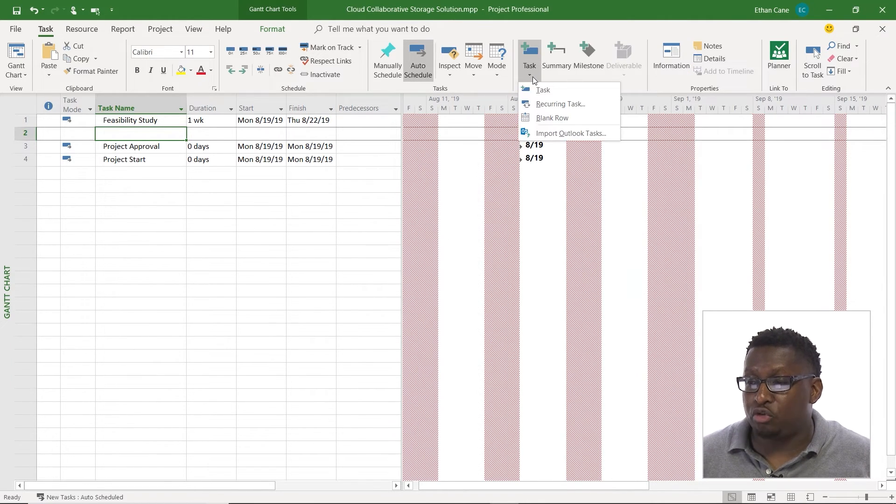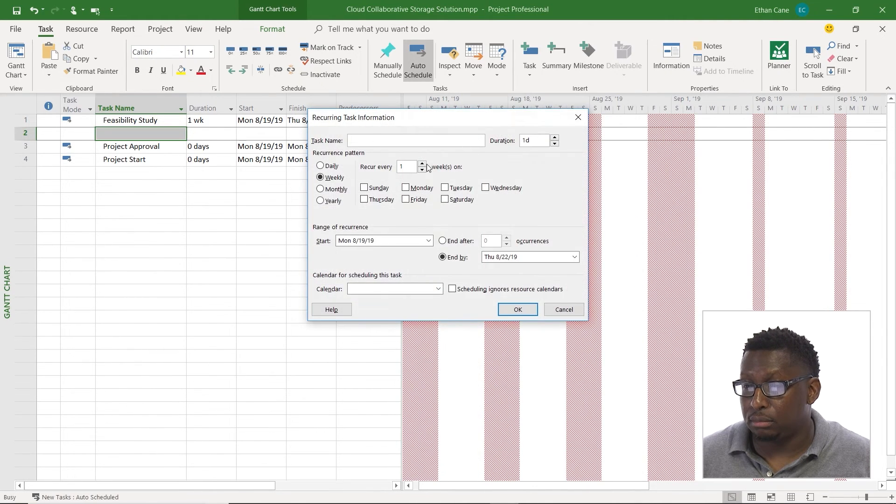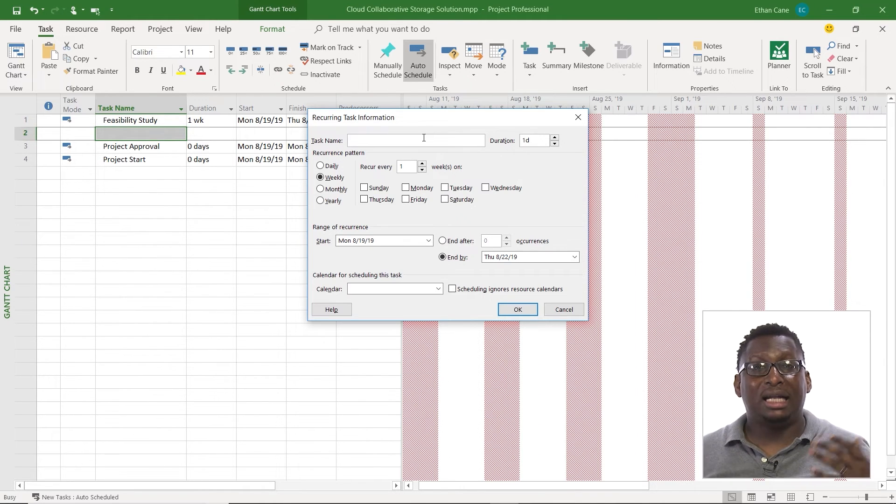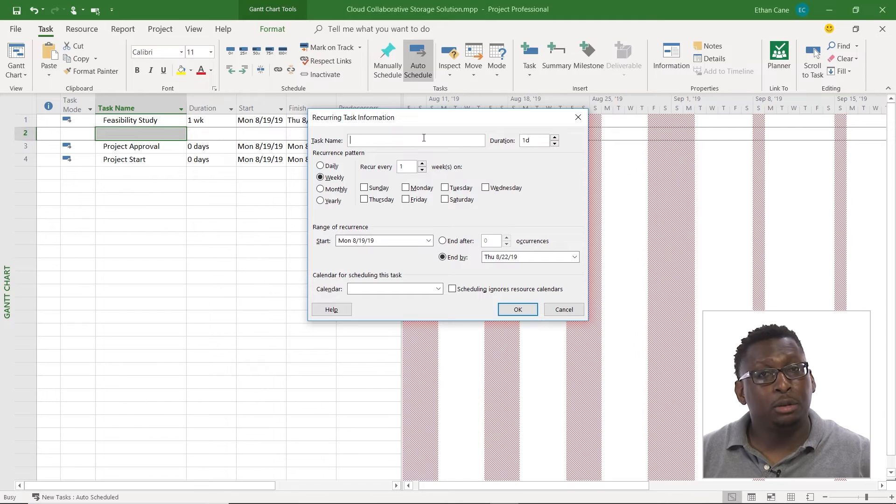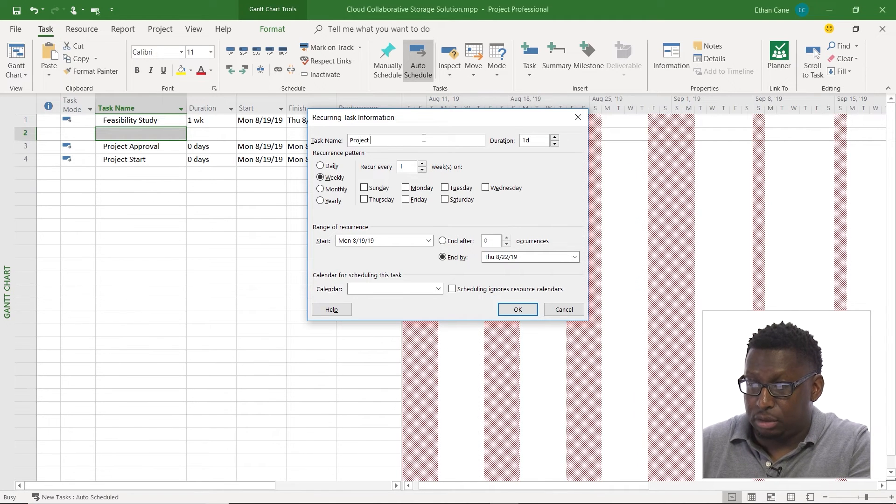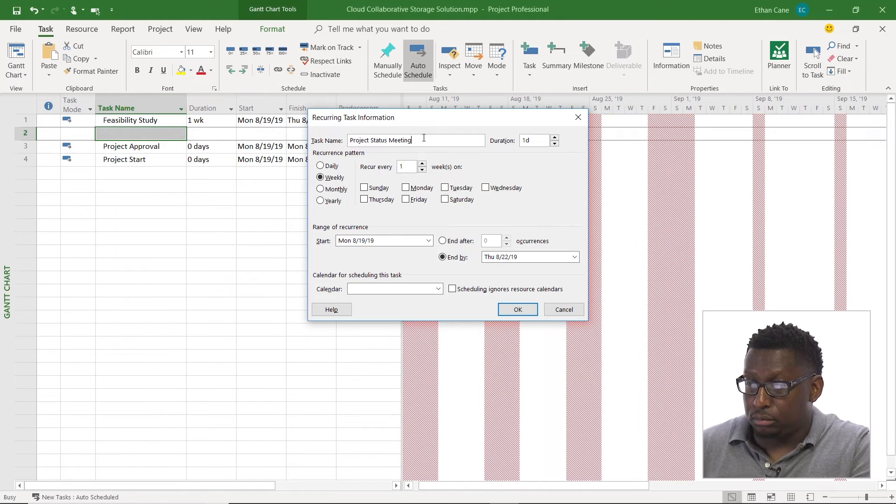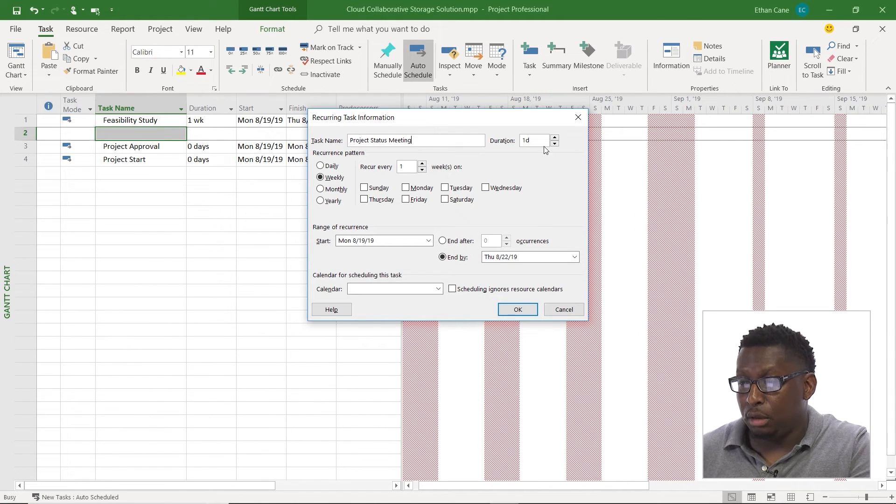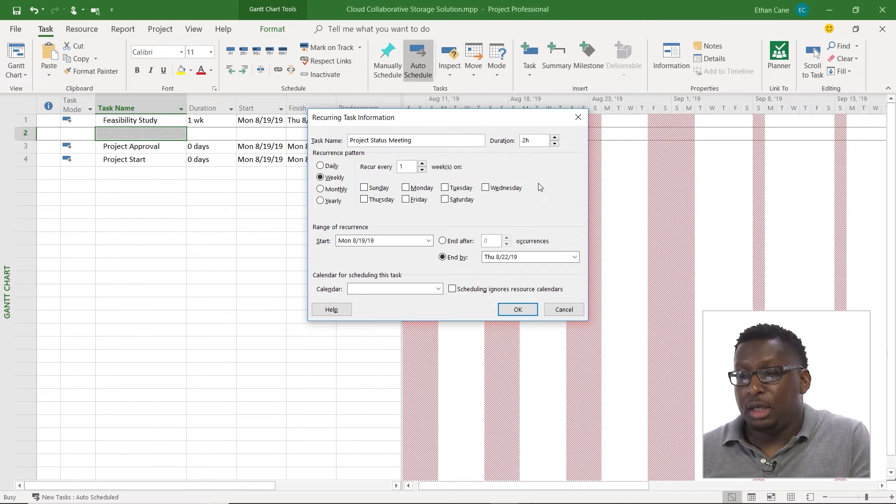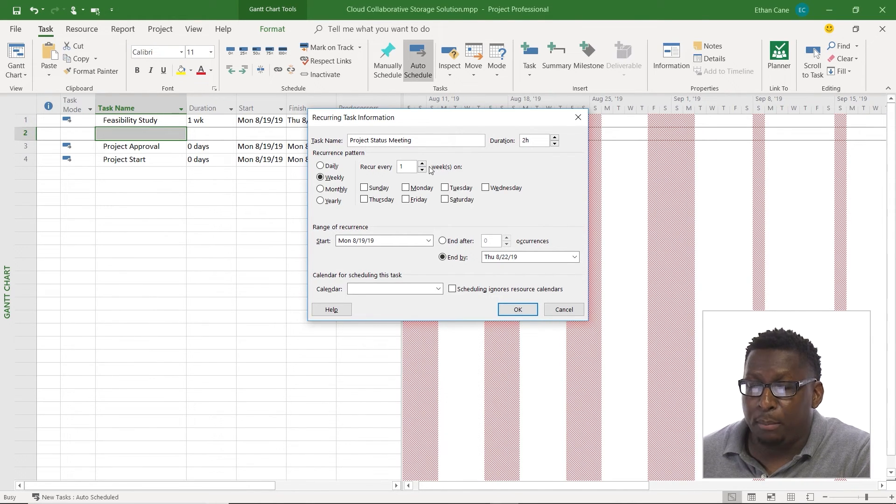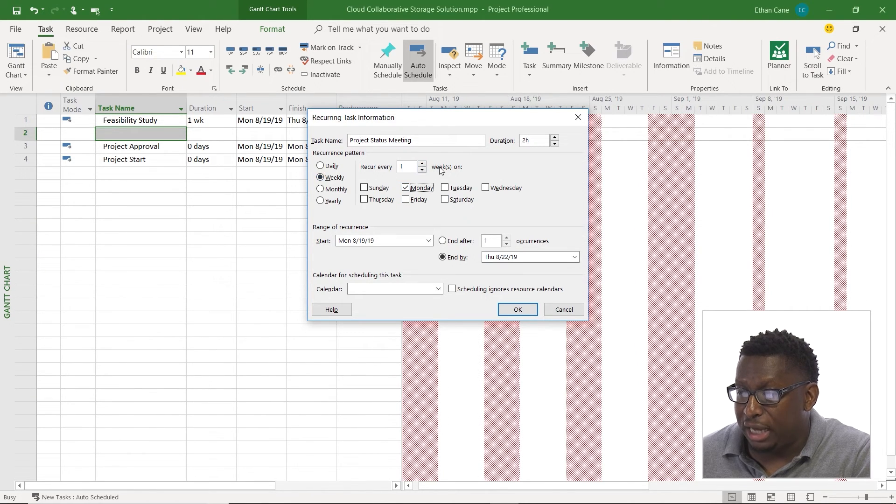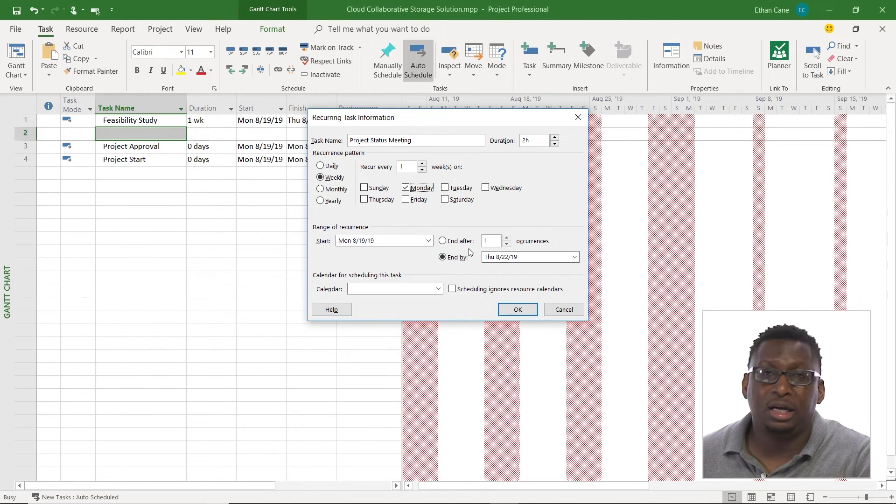So I'm going to go to my task drop down and I'm going to choose to do a recurring task. When I do recurring task here, I can give my task a name and I'm going to call this task project status meeting. I'm going to give it a duration of two hours. And I'm going to have this happen throughout my project every Monday. Every Monday we're going to do this. So weekly, every Monday.